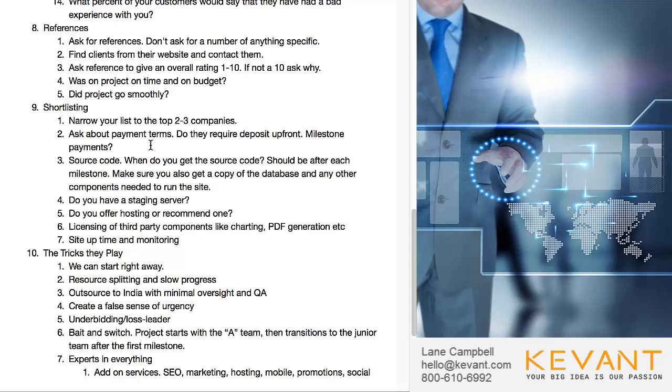Some companies do a very simple half up front, half when the project goes live. That may be a little bit risky for you to do if this is the first time that you've worked with this company. But you want to ask it at this point. You want to find out what their payment terms are, and if there's any flexibility there as well.